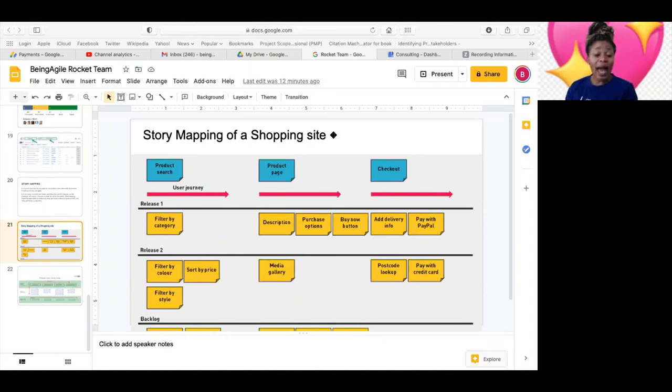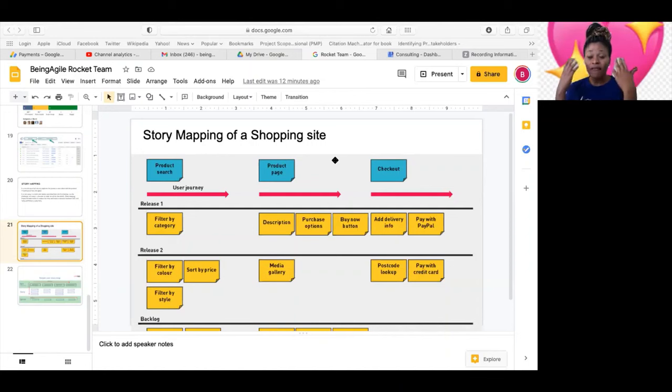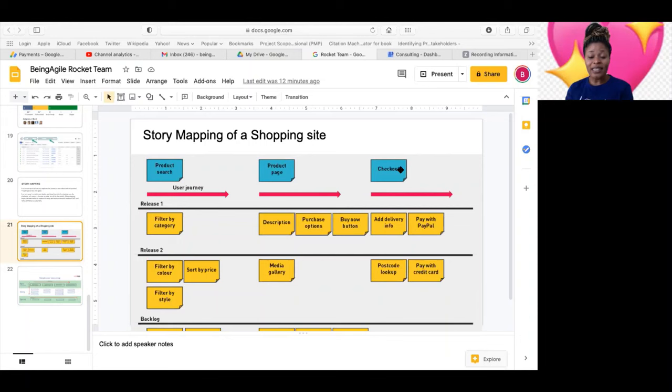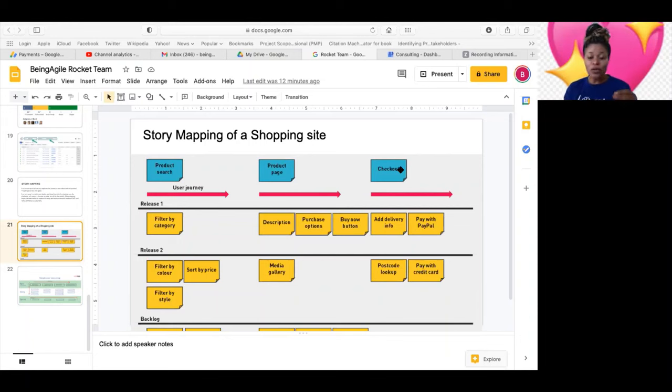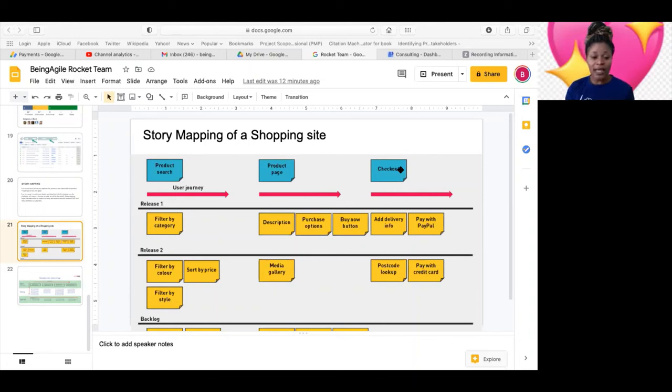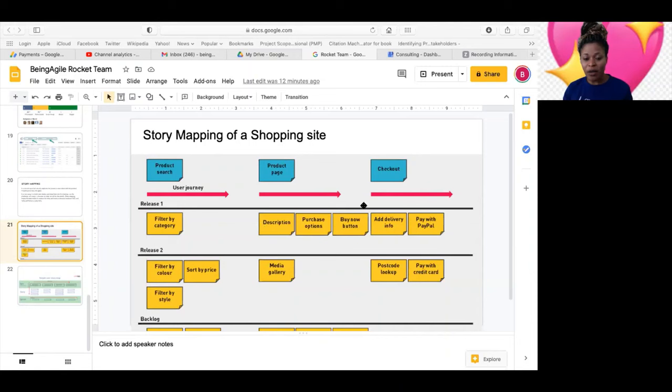How it works is, you can ask a stakeholder or a representative of the customer who has a good understanding of their vision, what they are trying to achieve, to tell the story. As they start telling the story on what they are trying to achieve or what they desire, it's a very collaborative period. You would see developers, everybody would just pick their stickies. Let's say if it's an in-person session workplace session, or an in-person workshop session. Everybody just picks their sticky notes. As he's telling the story on what he wants, they are writing them down on the sticky, just like this one and putting them on the wall.